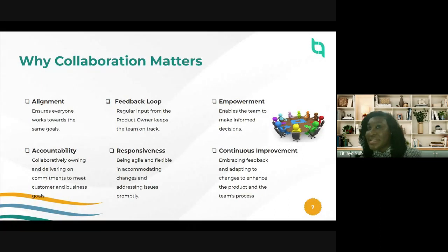That's what I mean by external stakeholders in this context. So getting into the development team now, how do you collaborate? We have something called our daily stand-up every day. Once you start your sprints, the sprint kind of feeds off what you have from your product backlog. You take it in, you talk about it, you break it down, you estimate it based on the timelines it will take for the team to actually deliver this thing in the 2 weeks or 3 weeks or 1 month, depending on what you agree.